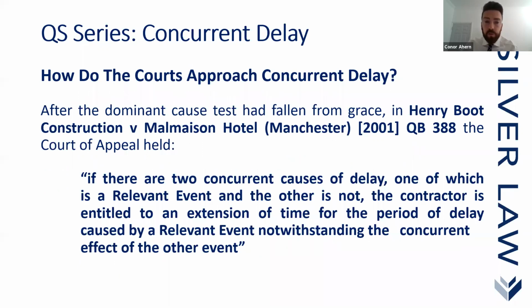After the dominant cause test has fallen from grace, what we're seeing in Henry Boot Construction versus Malmaison Hotel is that the Court of Appeal held that if there are two concurrent causes of delay, one of which is a relevant event and the other is not, the contractor is entitled to an extension of time for the period of delay caused by a relevant event, notwithstanding the concurrent effect of the other event. And this is largely the definition that continues to this day.